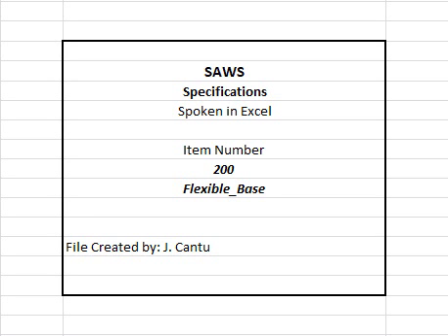200.3 Submittals. Contractor shall submit manufacturer's product data, instructions, recommendations, shop drawings, and certifications. All submittals shall be in accordance with engineer's requirements and submittals shall be approved prior to delivery. 200.4 Material. The material shall be crushed as necessary to meet the requirements hereinafter specified, and shall consist of durable stone crushed and/or screened to the required particle size, with or without other approved fine-sized material. The material shall be from approved sources.